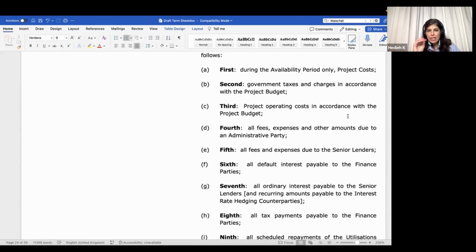So you understand the importance of this cash flow waterfall now, because the ranking that we put in the cash flow waterfall gives us the ingredients for the metrics that the lenders use. For me, in a project finance model, the main output is this cash flow waterfall, and the byproducts are the metrics that we calculate, which all come from the cash flow waterfall statement.